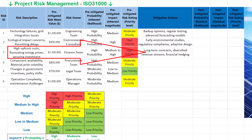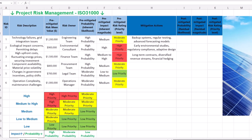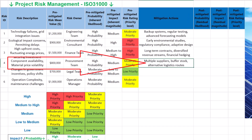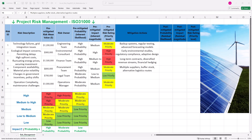Implementing mitigation actions such as long-term contracts, diversified revenue streams and financial hedging aligns with best practices for managing financial risks in renewable energy projects. According to the United Nations Environment Programme, financial risk management instruments like contracts and hedging can transfer certain types of risks away from investors and lenders, reducing financial costs. For supply chain risks, engaging multiple suppliers, maintaining buffer stock and establishing alternative logistics routes reduces dependence on a single source and ensures operational continuity during unforeseen events.